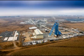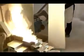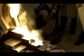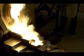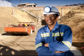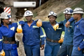Burnstone has been intensively developing the ore body and has finally begun stoping, extracting ore for processing. The project has achieved several significant milestones, including the commissioning of the metallurgical plant, which was completed on the 1st of October 2010 and had its first gold pour 30 days later. 13,239 meters of on-reef development has been completed with good consistency in the continuity and values of the exposed reef.